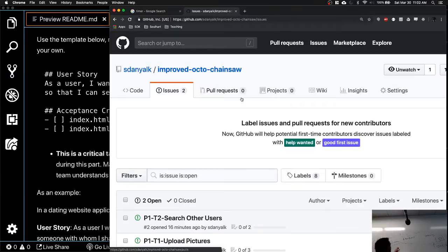Okay, what happened? You didn't waste any time. You worked on it for 2 weeks. Now this changed, so you come back over here and then you modify your plan for the next 2 weeks. Then you make those changes, you come up with a plan, and then you go back and show them at the end of the next 2 weeks, and they're like, well, yeah, this is looking better. Now I want 2 at the bottom too, right? Whatever the plan is, you go back and keep changing it. All right. So what happens is at the end of the 6 months, they can actually see what they're paying for also.